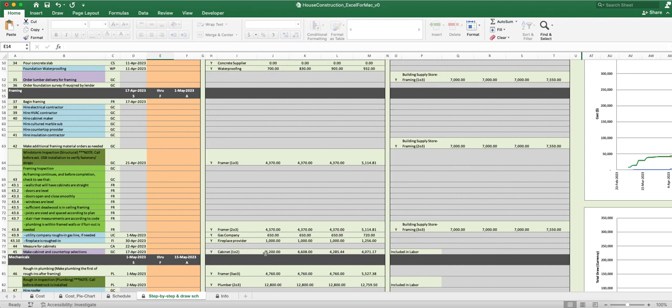For the payment on the cabinet, for example, you can see this is one of two payments. The first payment here is just to get it ordered and get him working on it. That's $4200 around 17 April. That'll be on your cash draw schedule.